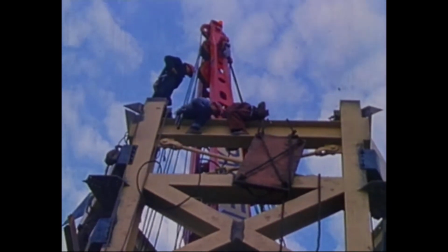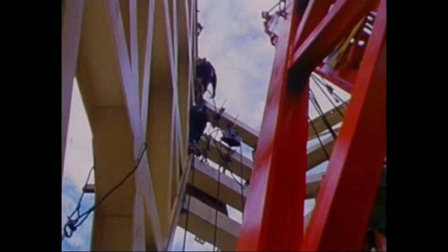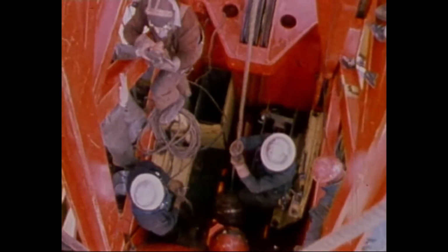During the course of Space Needle construction, the derrick is jumped about every 7 days. With a cable speed as low as 11 feet per minute and pulley reduction, it's possible to move steel gently enough to crack an egg without breaking it.